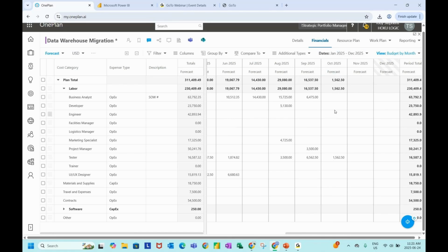And then I can see I've got only tester, that's the only cost coming in October. And if you wanted to finish your testing prior to October, you will be able to do that and look at your run, how that looks from the financial side of things, how your end date or your resources are allocated. So that will give you when you are scheduling your different resources. And then you have to go and adjust your schedule based on what the cost is coming up later in the year for this particular project, for example.